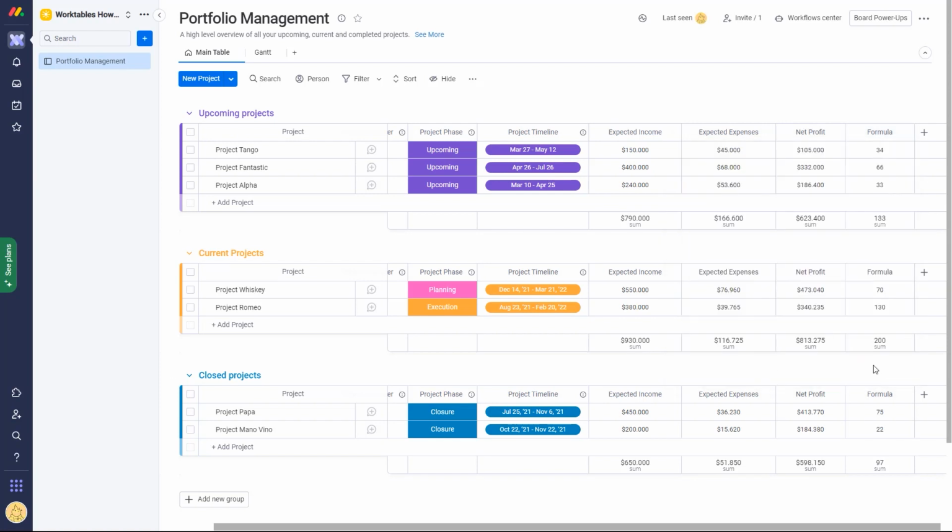Click on Set Formula, and now we have the number of days that it will take to complete the project. This is the amount in working days. We can format this value by going here and selecting days. Then this is correctly formatted, and this represents how many working days we'll have to work on the project.